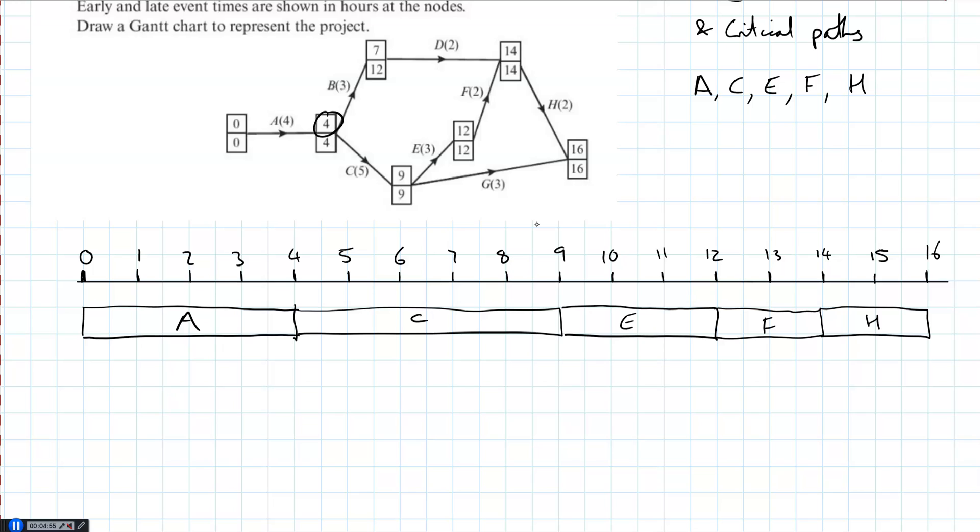So B can start at 4. So B's going to start here. It takes three days, so that'll take us up to 7. So we can fill B in here. But we have this float time, because it can go up to 12. So the float time is 12 minus 7, so the float time is 5. So because it goes up to day 12, I indicate float with a dotted box on my Gantt chart.